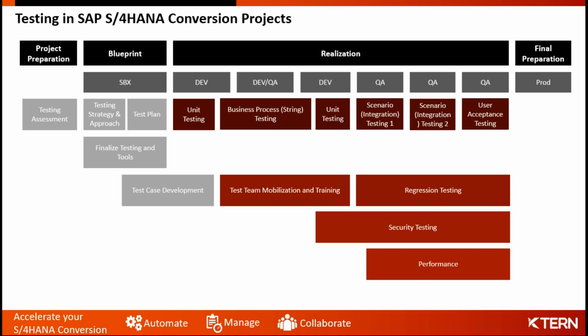Of course, during a project, the system integrator team aren't the ones who will be testing it, because it is totally illogical to have someone who doesn't understand the system or the business process undergo the testing. So there will be a separate testing team working on that. For them to test, we have to make sure we hand over the essential documents like test scripts and the test execution results. Obviously, this doesn't become the responsibility of a system integrator during a project, but still, he's accountable for the phase closures and he's accountable for the defects that come out of testing.